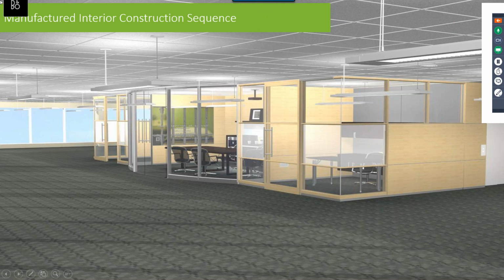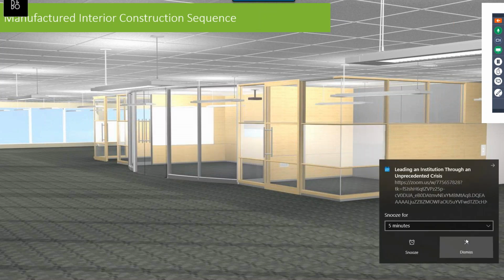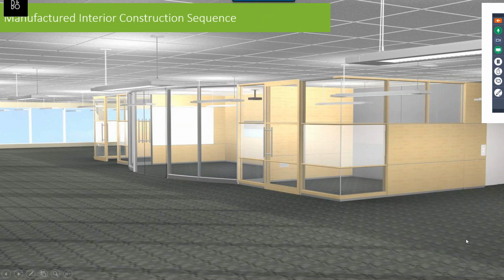Thank you. How is fire sprinkler and fire alarm installation handled with these types of projects? Fire sprinkler, all of that work would be done in advance of the assemblies coming to site. What we do is take the drawings created from your vision on the campus side through your architect, and a CAD file is sent to us and we lay on our assemblies in line with the vision of your finishes and the architectural vision of the space.